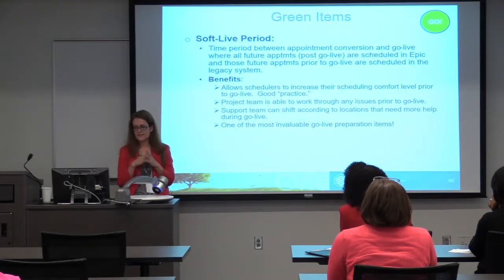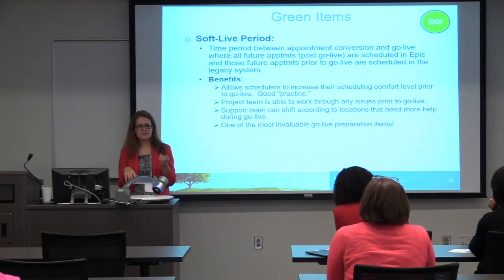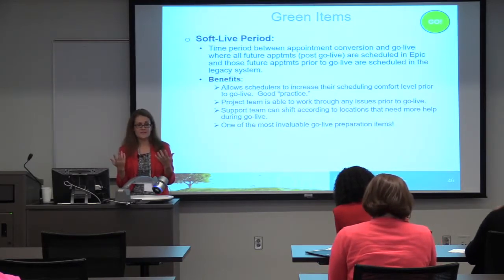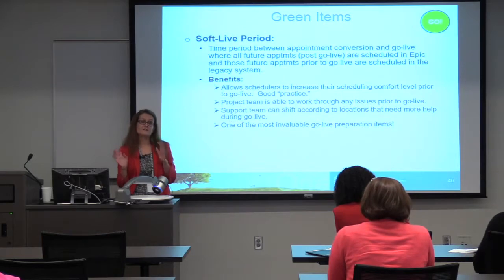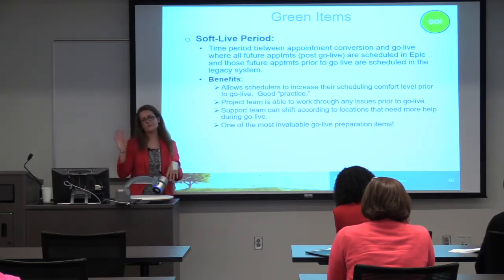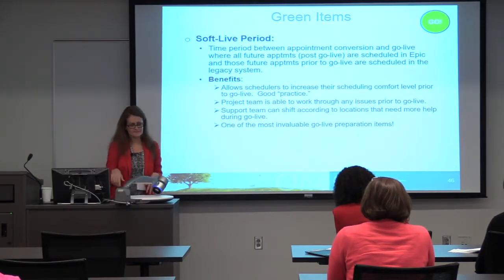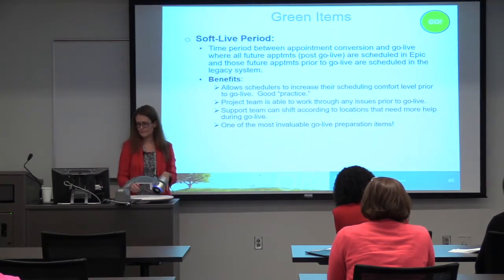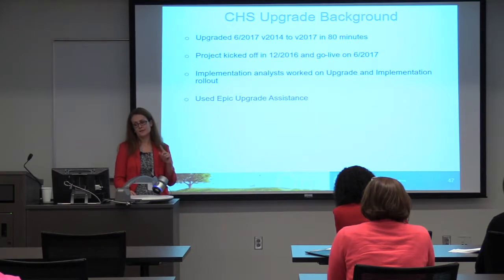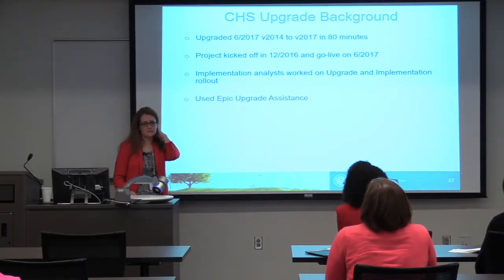So absolutely, I feel like this is one of the reasons that we have really been successful, because during this soft live period, we're able to resolve issues, shift support, and really see, it gives us an idea of how this go live is going to go. So if soft live's going pretty good, it usually means go live's going to go pretty good. All right, so before I go into the upgrade, any questions?